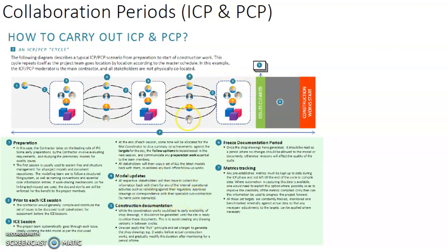And when the process is completed, there will be construction documentation. While the coordination works could lead to an early availability of shop drawings, it should not be generated until the site is ready to utilize these documents. This is to avoid creating any drawing versions between the cycles.